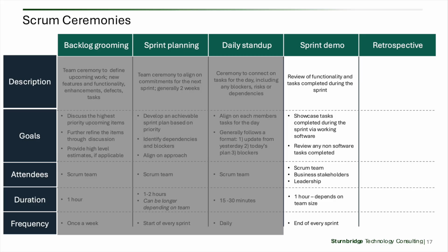The more digitally mature the outside Scrum team members are, like the business stakeholders and leadership, the easier it is to be open about where the software is. In my experience, if the business or leadership are not understanding or confident in the Scrum process, teams end up doing an internal demo first and then an external demo to make sure the demo and use case look good back to the business and the leadership stakeholders. This can sometimes be counterproductive, as teams should be focusing on the right approach versus just stringing together software just for a demo. And that's kind of the risk here if you don't focus on doing the right things and just trying to make demos happen because Scrum says it should.